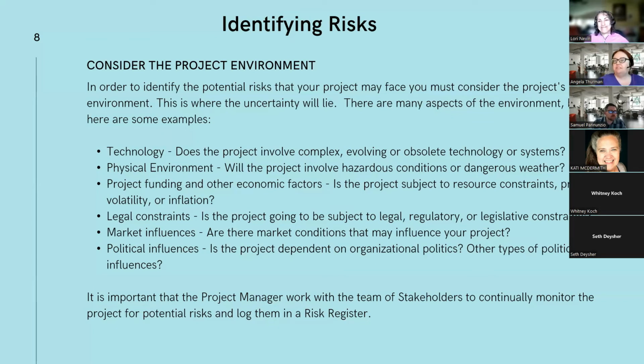That involved, number one, getting the buy-in of my airline customers and going through all of the testing and certification required to show that the new product was a drop-in replacement, and that had to be done in a very short time because there was an absolute date when the supplier would no longer produce the existing product.